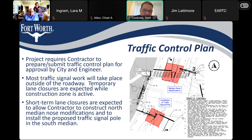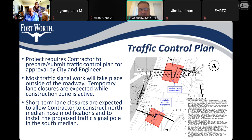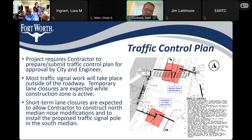I want to be clear: 99.9% of the time, at least one lane will remain open. There could be additional brief lane closures when moving certain things across, but the overall plan is that for the most part, we are going to keep at least one lane open in all directions on this project during the entire construction phase.